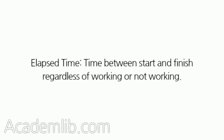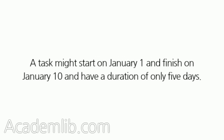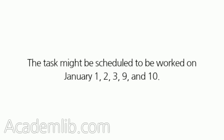Elapsed Time: the time between start and finish regardless of working or not working. The elapsed time of a task shows the start and finish dates regardless of whether the task is being worked on. A task might start on January 1 and finish on January 10 and have a duration of only 5 days. The task might be scheduled to be worked on January 1, 2, 3, 9, and 10.